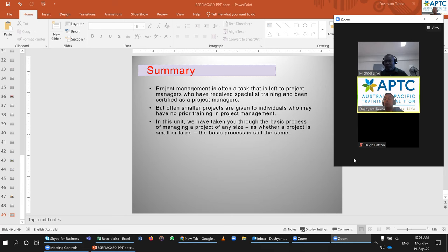So if I were there, I would say, okay, I'm reporting to my manager. And if, for example, the project is 3 months long, then at the end of the first month and at the end of the second month, I'm reporting to the board of directors or the owner of the company via a Zoom meeting, or emailing them: hello everyone, hope this email finds you well, the introductory part. Since we approach the 4-week mark of our project timeline, we should have completed 33% of the project, and here is my update on it. Either you're above 33 or you're below 33, right? Every time, reporting will save you a lot of pain, number one.